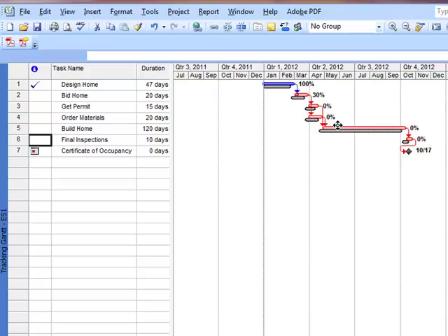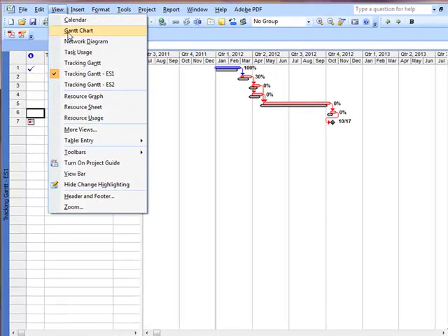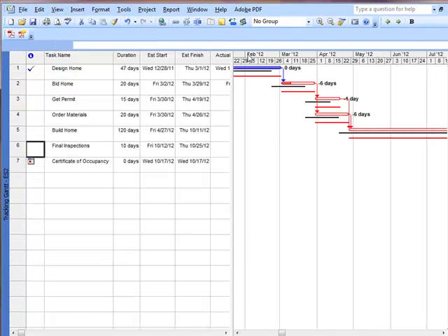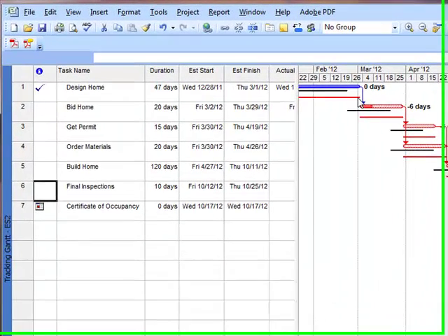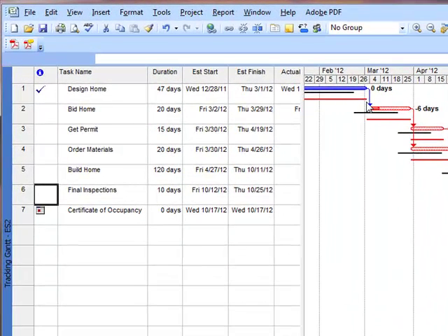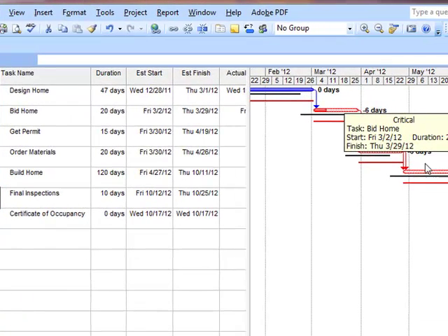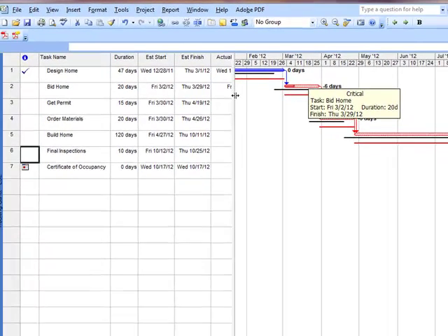I don't like that look at all. So we're going to go to View ES2, and that's what we get to see. If you want to update ES1, the only thing I would recommend is going to this format, copying ES2, making it ES1, and getting rid of the baseline 1. You'll get a good idea from the beginning of the project to where you're at, so it doesn't get too crazy. So anyway, here we go, and now we're going to start updating the project.